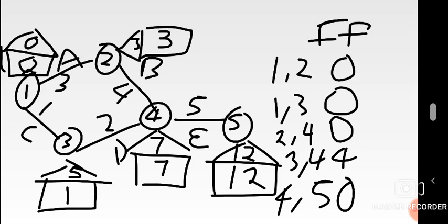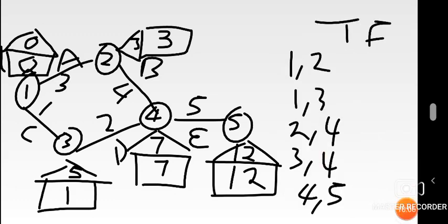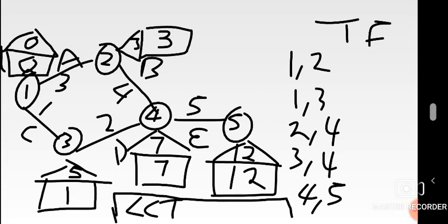Let me just quickly erase this for the sake of now total float. So when you look at total floats, I want to squeeze the formula just down this network diagram there. The formula is latest completion time of the ending node of the two that are connected to each other minus earliest start time of the starting node. Okay, so I want to explain all that.